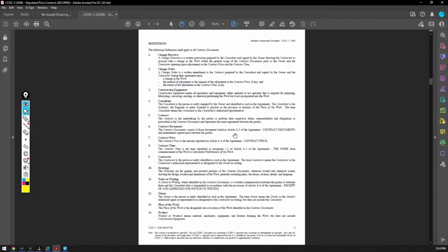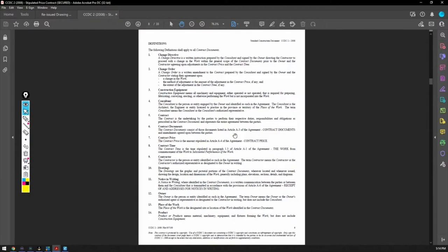That's a very important step at the final stage, is to write down, I'm going to give you a lump sum price for this based on issue for construction drawings, dated this, specifications dated this, and addendums one to five or whatever. And there might be other documents you might have to put in there, but you get the idea.